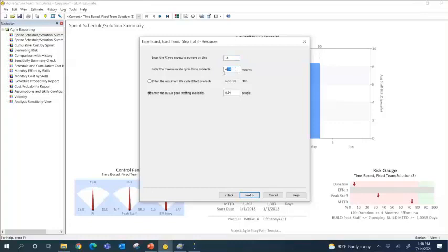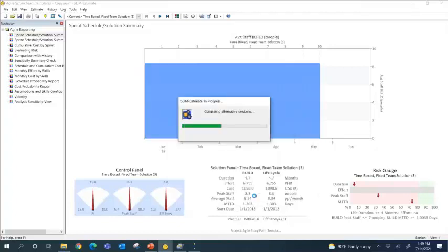And then I'm going to put in what my fixed parameters are, right? When we're doing Scrum, they often tell you, well, I already know the schedule. Okay, fine, we'll put it in. I already know how many people. Okay, great, we'll put that in. Because it's early, we're making a go or no-go decision. We want to know if those parameters are realistic or not so we don't lose money and so we don't lose a client. So the PI was automatic, came in for me, and then the parameters that the customer wants, to make sure their targets are realistic. So I'm going to hit next, and it runs the model and brings me back to that analysis area again.